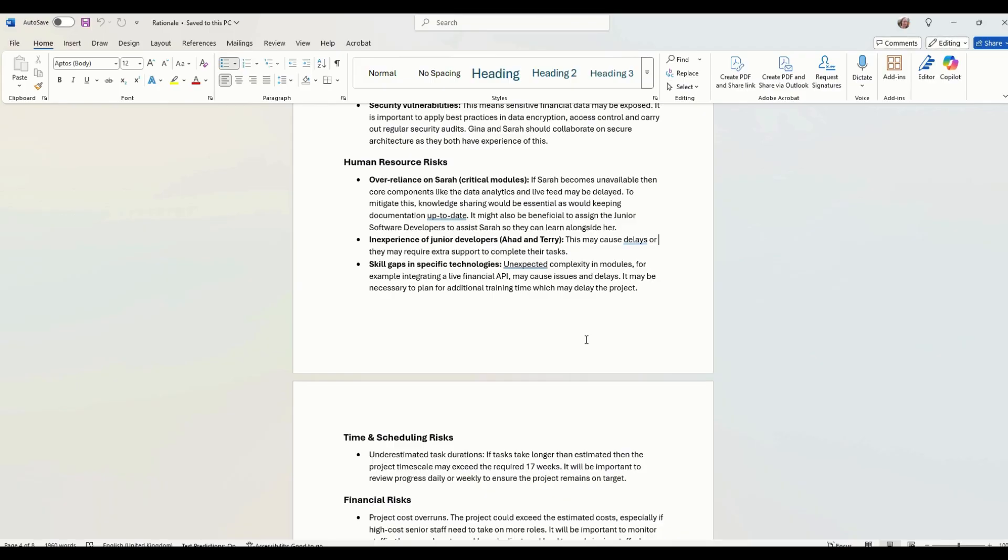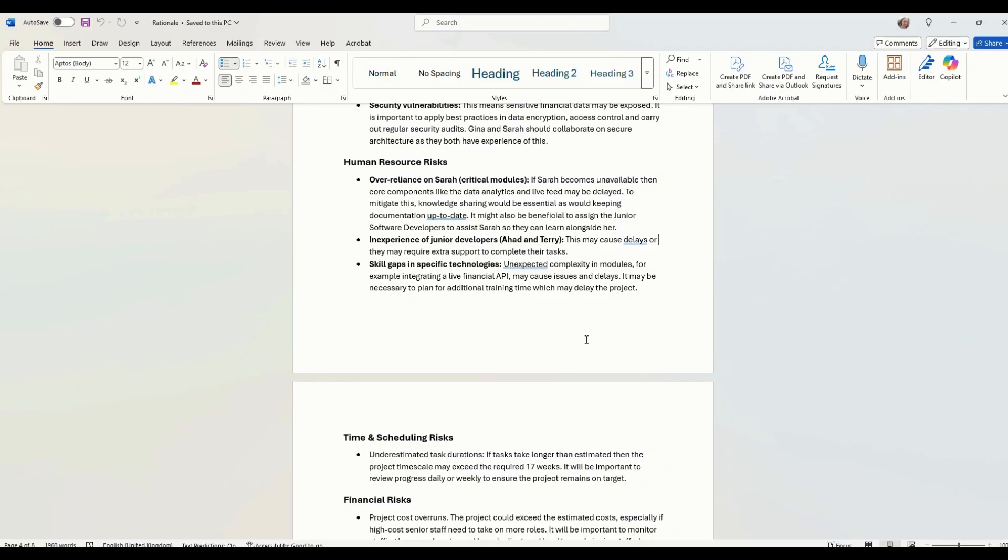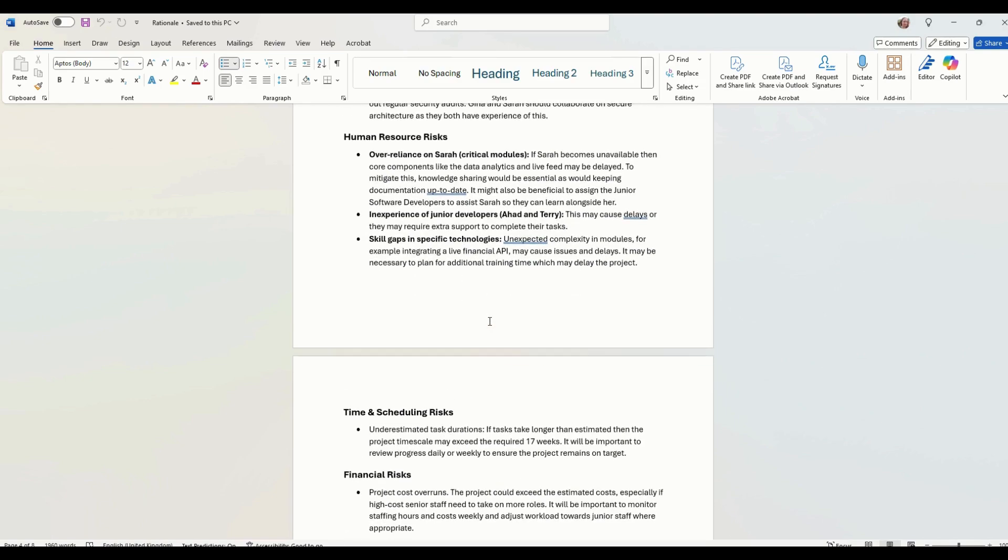Inexperience of junior developers might cause delays. So again, it might take our hard a bit longer to develop, write his code or test whatever he's doing. Skill gaps in specific technologies. So we might come across a live financial API that we need to use. Maybe Sarah has not used that before. She's not across it. So she needs to learn how to do that. Maybe it doesn't work. Whatever reason, there's going to be some kind of delay.